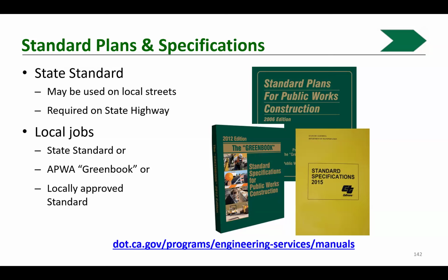They have to be formally approved. Yep, that's correct. They must be established and they must be assigned by a licensed engineer. They must be approved by the governing board of the agency, whether it's the county board of supervisors or city council, and they must be signed off by a California licensed engineer.